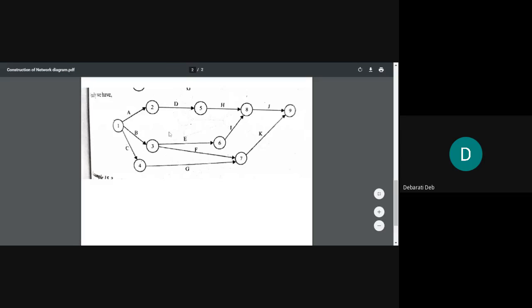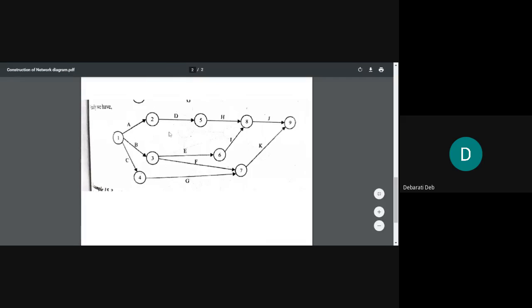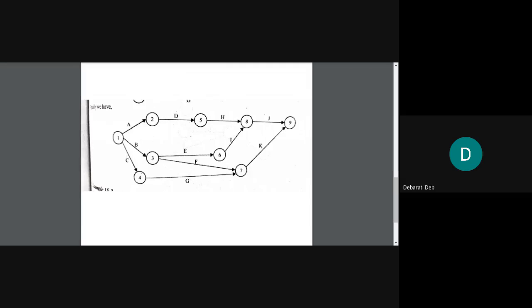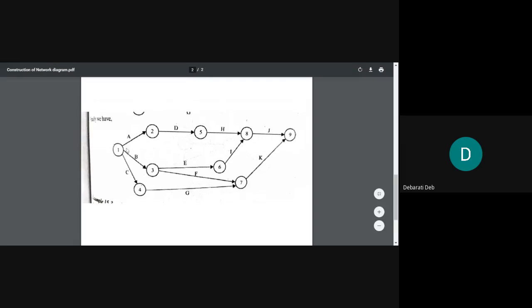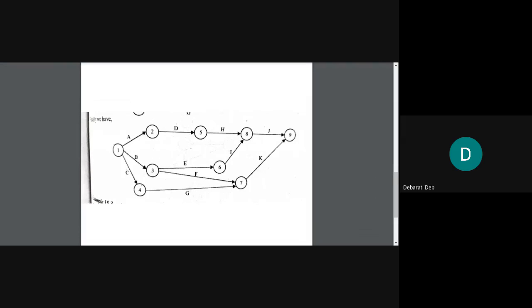Then let's see what is given. Then you will draw an event because activities will end, right? You will have to draw events after every activity. So draw 3 events after A, B and C respectively. One event will be the starting event and 3 events will be the ending events of the given starting activities. Then what will we see?